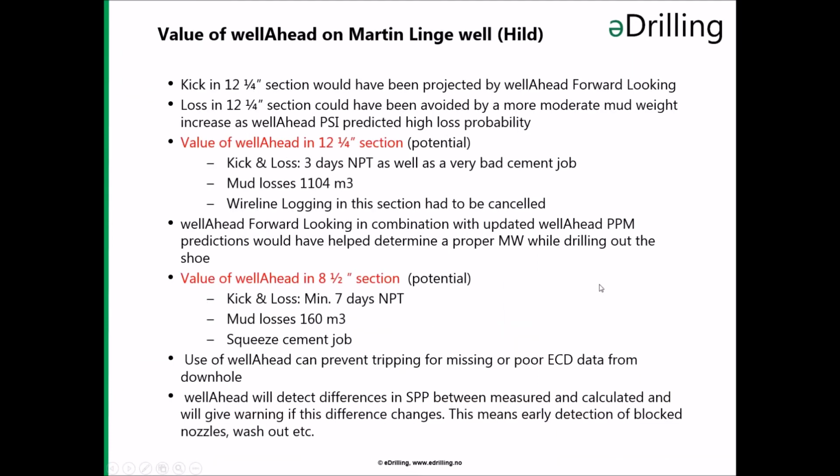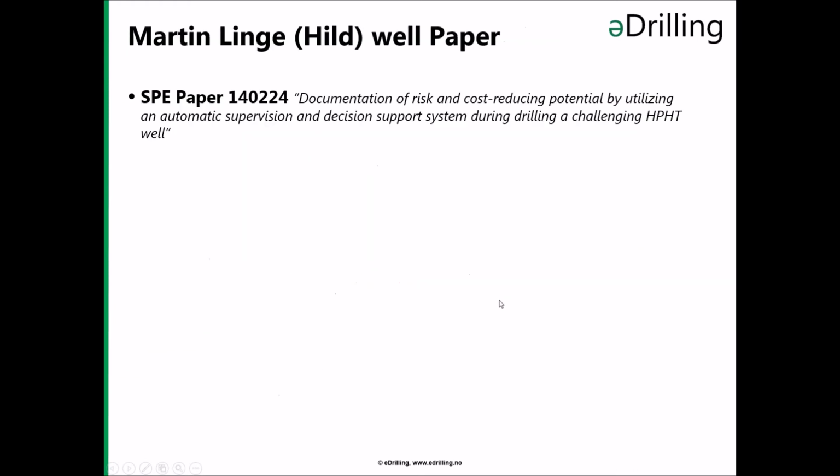On this well, we made a summary together with Total, and this slide summarizes the value which could have been achieved. Overall, we came to the conclusion that about 2 weeks of rig time could have been saved, and also a lot of materials, and the well integrity after the well was left could also have been greatly improved if the advice from WellAhead had been taken into account. There is a reference paper of this study made by Total and ourselves.